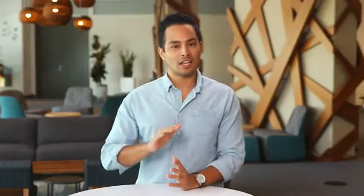Before you begin working on tackling the issue, you're going to need to define the project goal and talk to stakeholders about expectations for the project. In this case, the goal is to take average wait times down to less than 10 minutes on average, compared to 30 minutes.